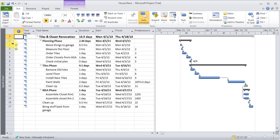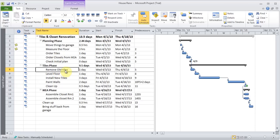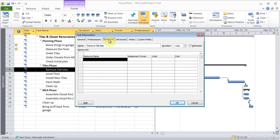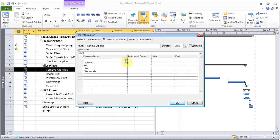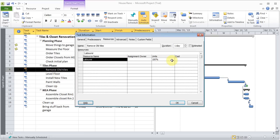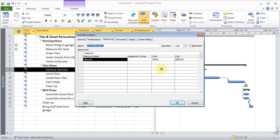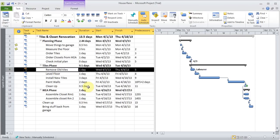And let's see, just to try it out, remove all tiles. Double click on it. And I can go to resources. Click in the box. Choose laborer. And I'll click OK. Now that name shows up in the Gantt chart. If I double click on it again, and there's the cost. So that's his rate, multiplied by eight hours. It's been applied.